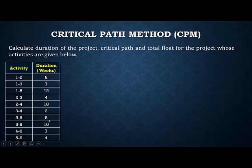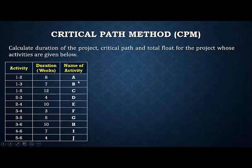Similarly, each activity and its duration is given in the next column. To solve this problem easily, we add another column giving the name of each activity. For example, activity A goes from node 1 to 2. Node 1 to 3 represents activity B, which takes 7 weeks. The interrelationship between nodes and the names of all activities are listed.